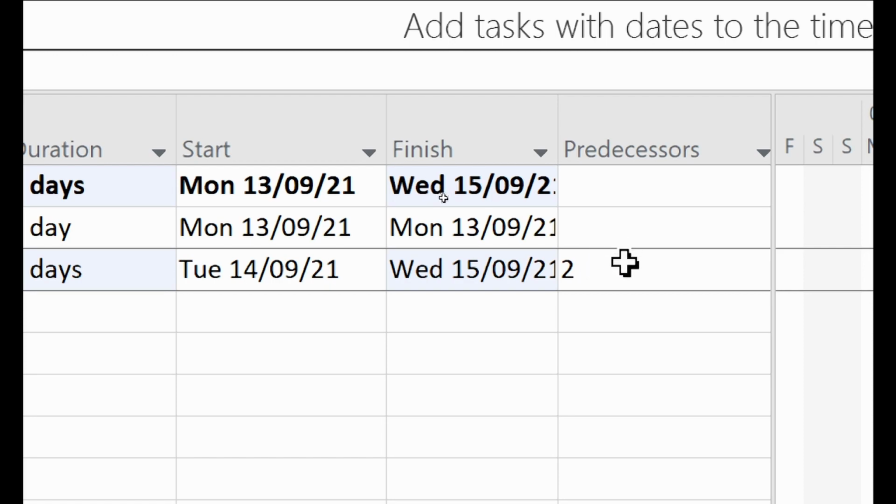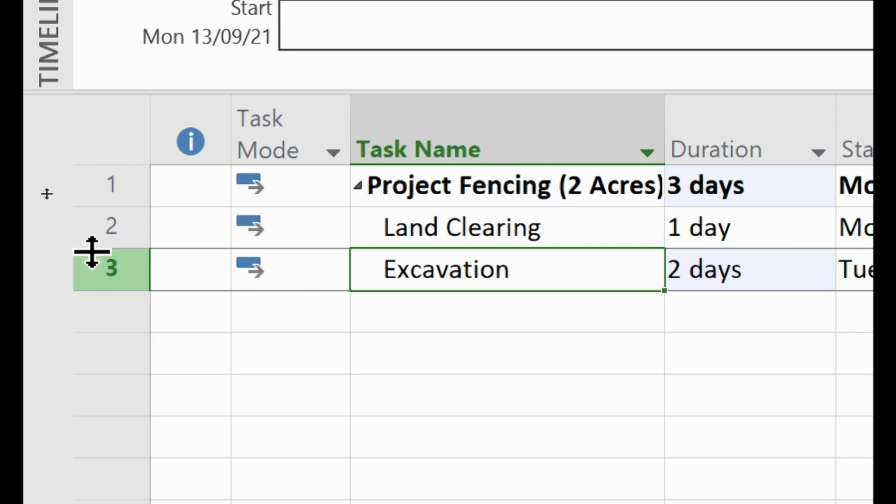For 2 days. No. That's not what we are talking about. Put the two there. Without the land clearing, you can't continue with excavation. Oh, okay. So what's the meaning of the two? The two here is a number indicating land clearing. Yes, it means row 2.